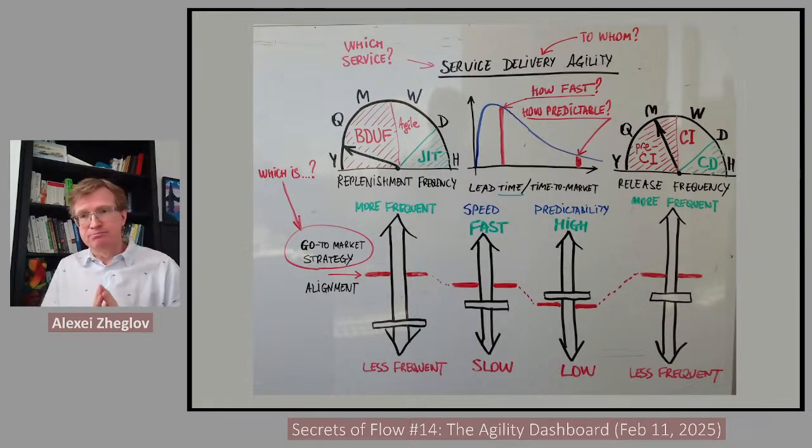We can potentially break it down as how fast and how predictable, because one number is just not enough. Time and process is not a number with maybe a little bit of delta around it. It is usually a pretty broad probability distribution. Time can be quite unpredictable, so it's important for us to somehow be able to communicate more than one scenario, perhaps an optimistic or mid-range scenario, but also the pessimistic scenario that is some kind of representation of unpredictability.